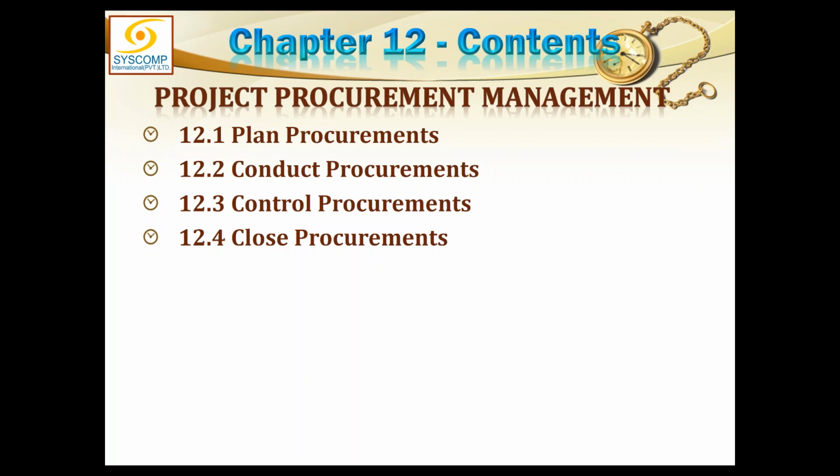Or third, you do have the capability and capacity both, but the task itself is too risky to handle by yourself. So you feel that it would be better to be handled by some experts. So you are trying to transfer the risk to a third party or to the subcontractor.